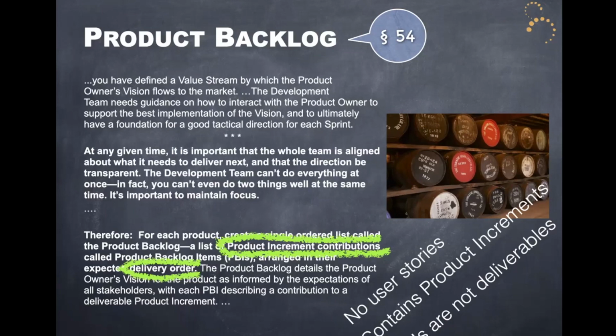No, the product backlog is a list of sprint goals that appear as product increments, and then they're broken down into these things called product backlog items, which are just units of internal administration. They are not units of delivery. That's a feature factory, and you're playing project management if you're doing it that way. A sprint delivers a single product increment, which is a nice, chunky piece of new functionality, rather than a list of 30 PBIs. And the product backlog's in delivery order.